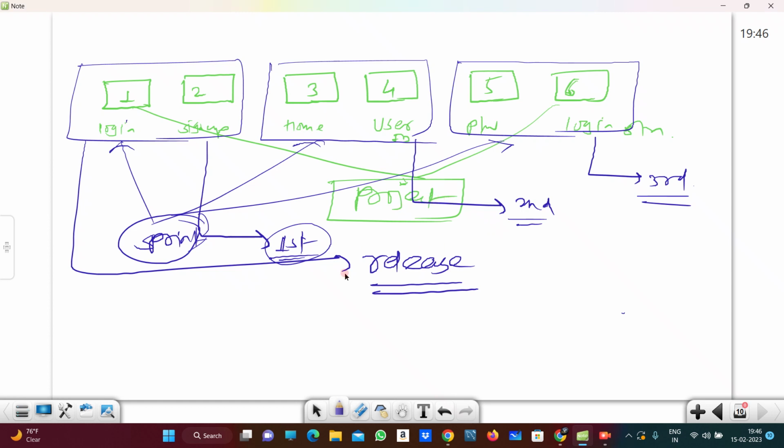But in the V model and waterfall model, what happens? In that process we have to wait for the completion of everything, right? But here we don't have to wait. Even though the home page and user id page still have to be completed, after completing the first ones we can release those 2 modules, right? So this is the main advantage of the agile methodology.